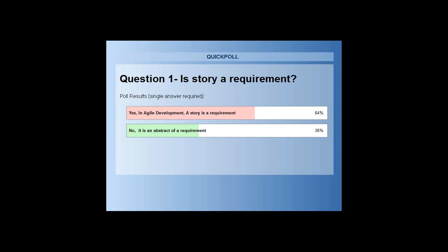In the Scrum process, we believe requirements are changing so often that we don't really need to document all the requirements. It will be more effective to simply create a story, representing an abstract of what needs to be done, and rely more on face-to-face meetings and on the team to deliver.